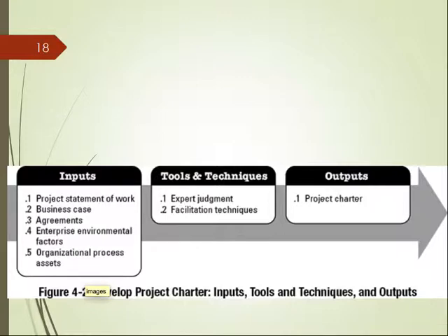You may remember in Scrum we have the term velocity. The velocity records the productivity of the team. So you can use those old data to help you predict the new project. So those old data inside your company will be your organizational process assets.